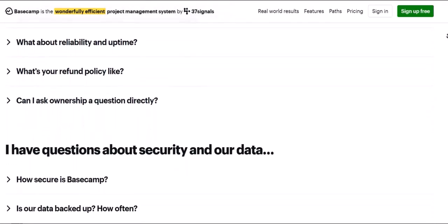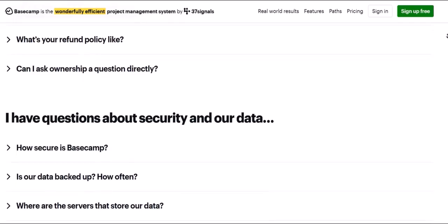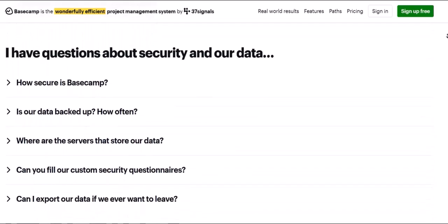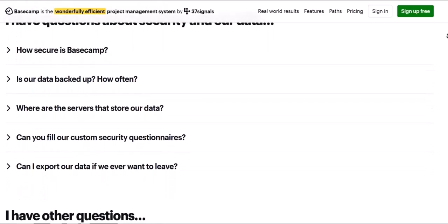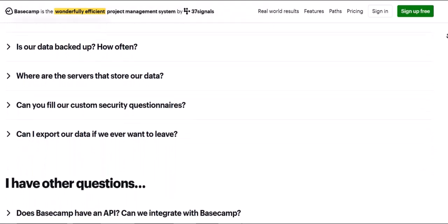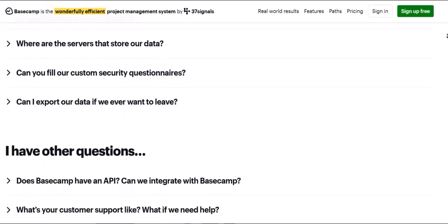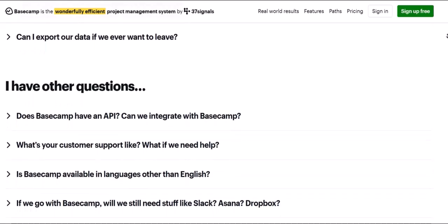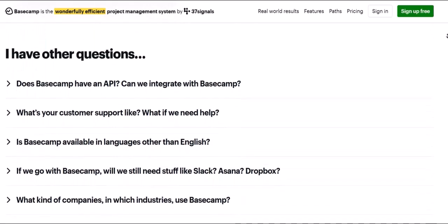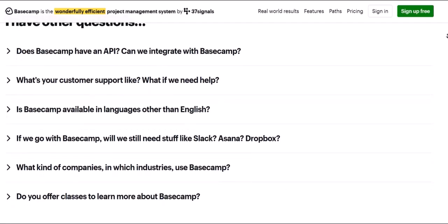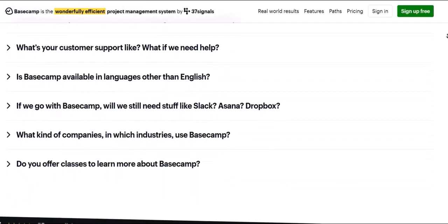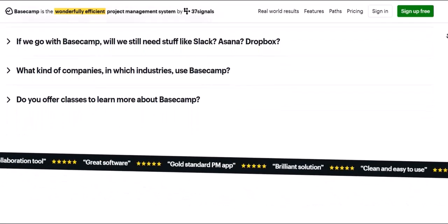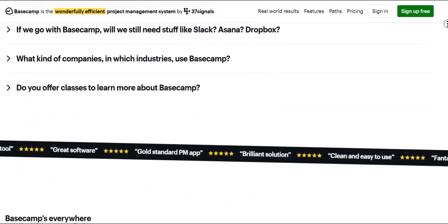Remove project-specific details. Go through every to-do, doc, and message. Remove anything that was specific to the original source project. For example, change Launch Spring Fling Campaign to Launch [Campaign Name] Campaign. Add placeholders. Use brackets or clear instructions to indicate where specific project details need to be filled in when the template is used. For example, instead of draft contract for Acme Corp, write draft contract for [client name].